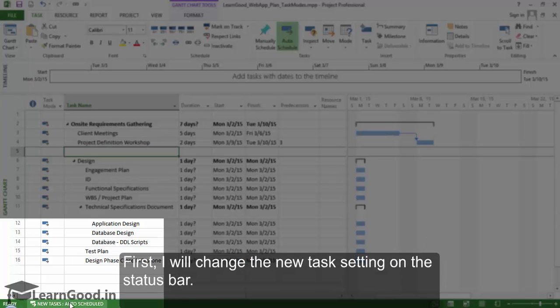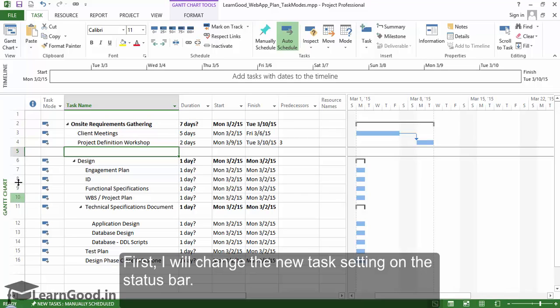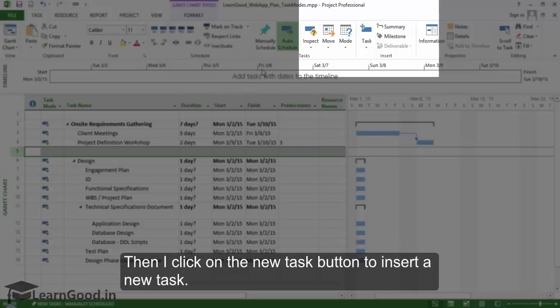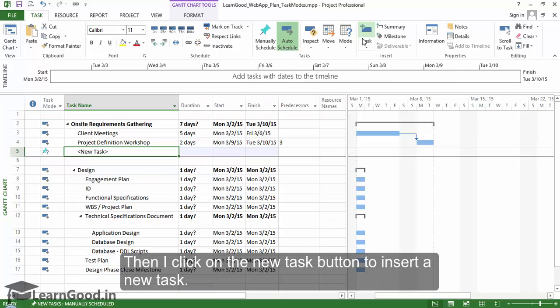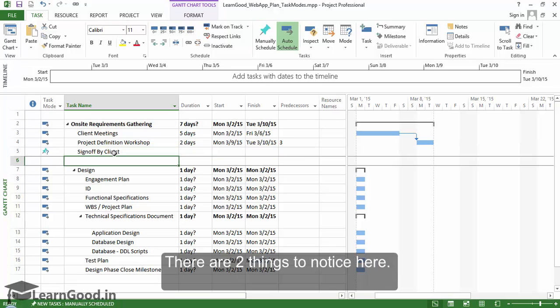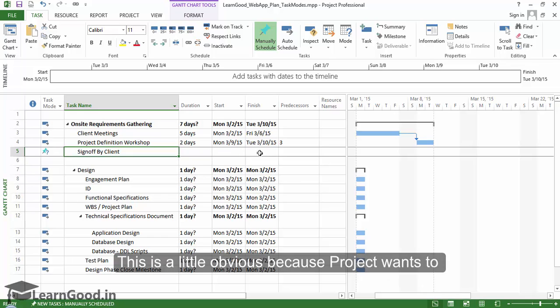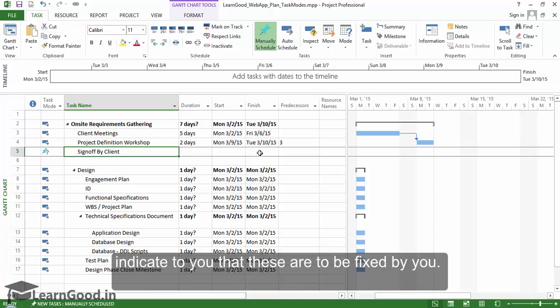First, I will change the new task setting on the task button. Then I will click on the new task button to insert a new task. My new task is created and I will give it a name, sign off by client. There are two things to notice here. One, Project has not pre-populated the duration, start and end dates like it did with auto schedule tasks. This is a little obvious because Project wants to indicate to you that these are to be fixed by you.